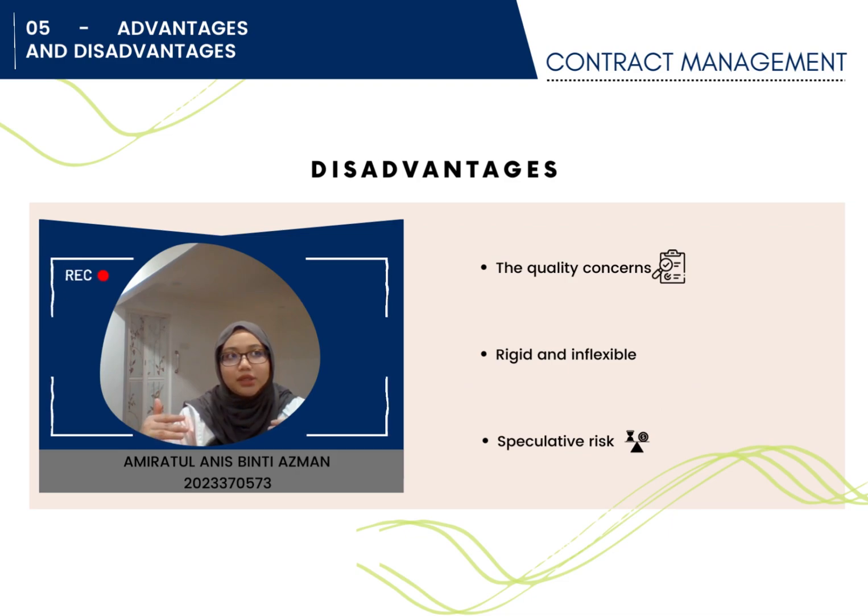Also, a potential issue with the design quality is that it might not be able to be constructed in time, because the design might be made up using materials that are difficult to allocate or that the design is unsuitable for the environment at the site.